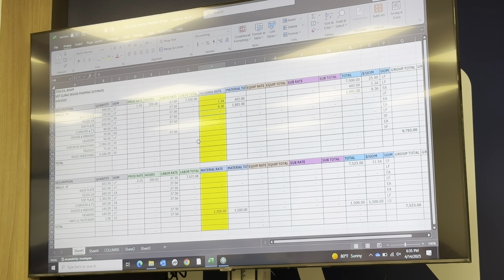And then I'd figure, for your sheathing, I think you can call it out, is your typical ZIP sheathing for your exterior sheathing. He said it's not spec. I had OSB and Tyvek in there. Hey, I'm fine with that. I mean, that's perfectly defendable. Hey, you might price it both ways and tell me which one's most cost effective. Add alternate.